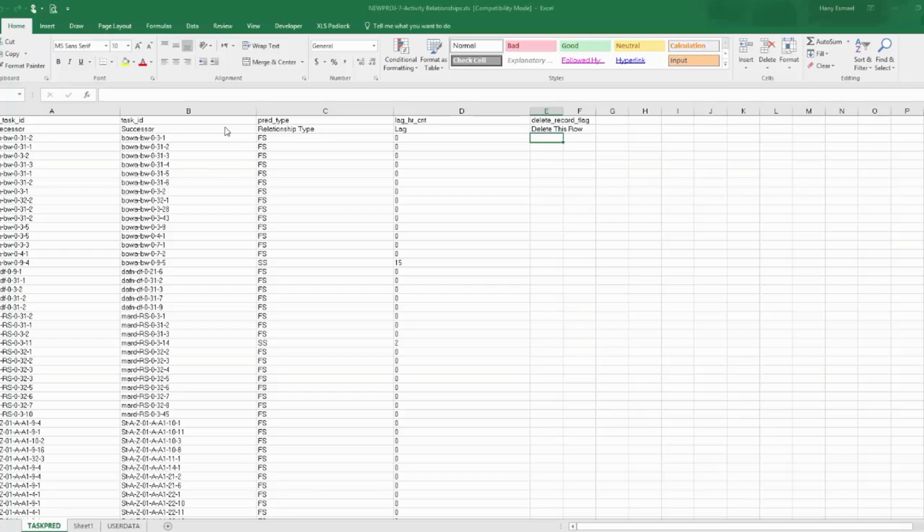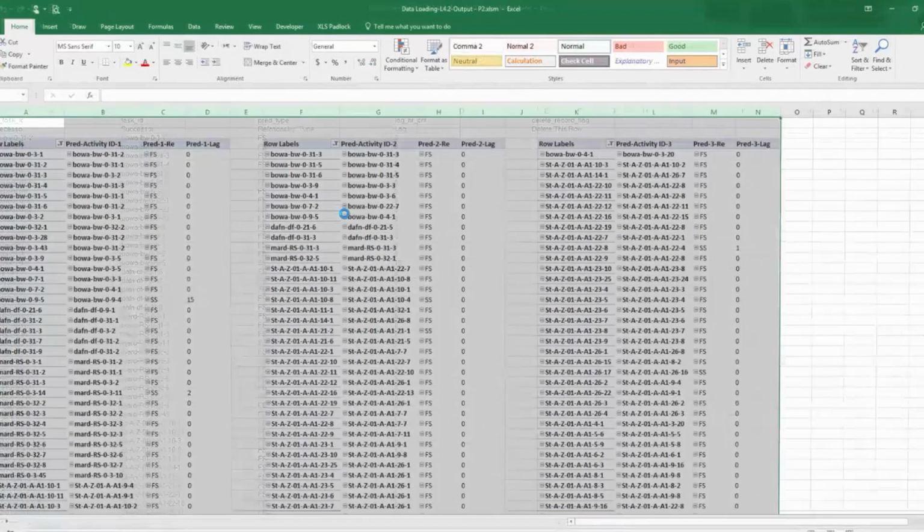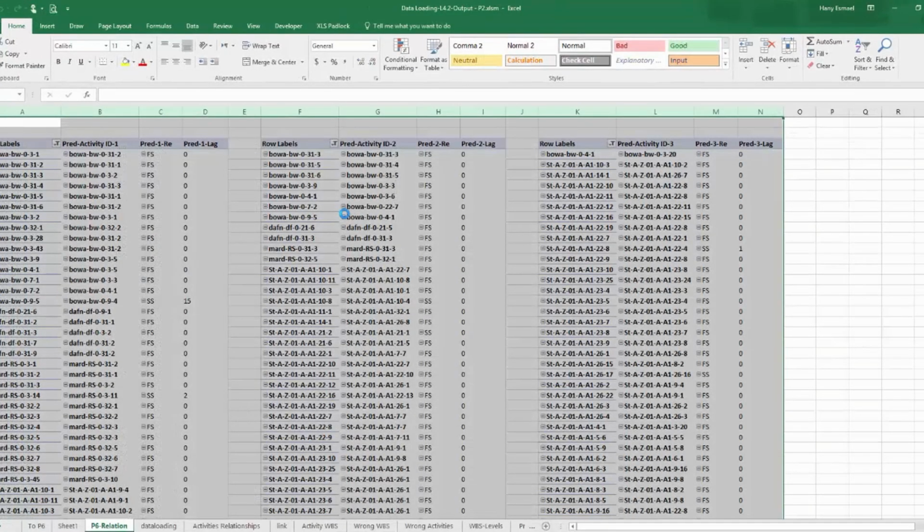We assumed some relationships, okay, and there is one step remaining to be sure that these relationships already exist, because we are creating a task ID or activity ID from our imagination. We say, okay, this item could be linked to this 1, 2, 3, 4. What if we have 1, 2 only? We don't have 3 and 4. In that case, the activity ID will not exist.